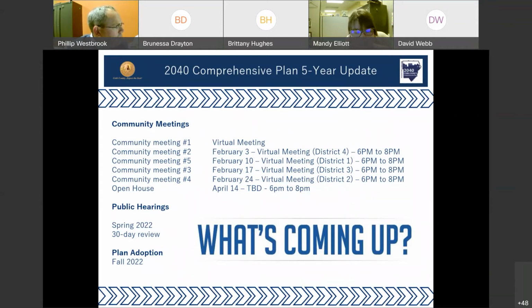We hope to have an open house in April that will allow the public to view draft proposals. After that open house, we will announce that the draft is ready for review by the public for a 30-day window, as Phil has talked about. Then we will take those comments and create a final draft to present to the Department of Community Affairs and the Board of Commissioners for final adoption by October 31st. Please keep an eye on the website for further updates and potential changes, and we thank you for your flexibility as the schedule may change.